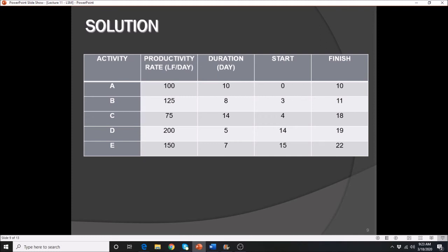The third thing that you need to keep in mind is that we need to avoid an intersection in the start or on the finish time. Okay, if that is the case, and if the problem tells you that you need to provide a minimum buffer, say 1 day, make sure that you adjust the finish date, and then subtract the duration from the finish date, and then you will be able to calculate the start time of the given activity.